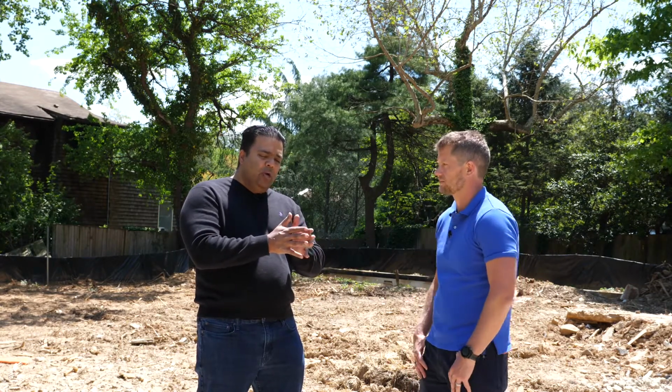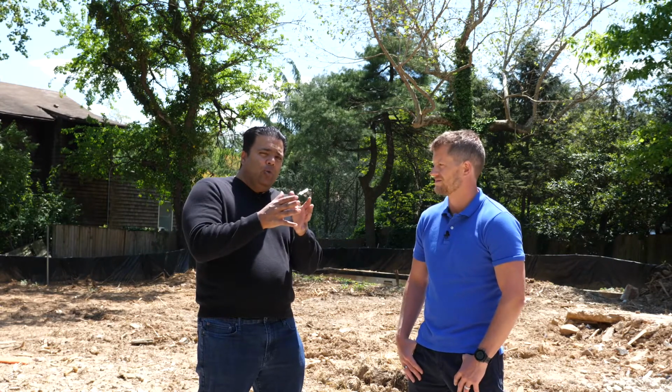Yeah, anybody experiencing construction, that's a very important point you just brought up, and we talked about it at our meetup last night. You know all the phases of the project. There's the pre-construction phase, and I break the actual construction into about 5 phases. While you're working on one phase, you should already be anticipating what's going to be needed in the next phase and start getting those things ready.